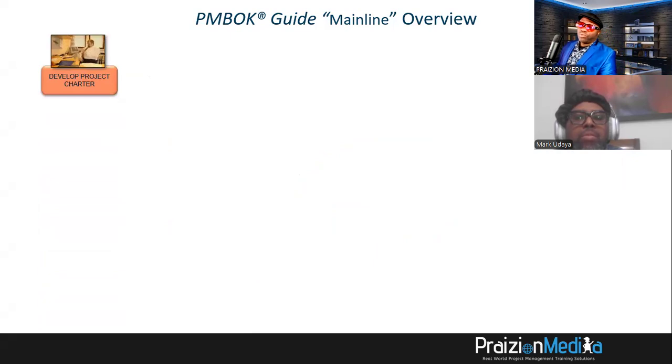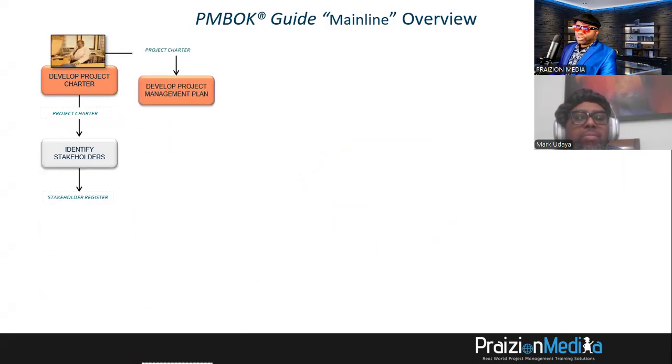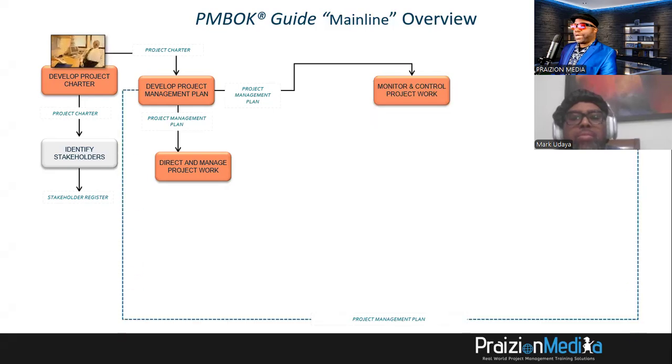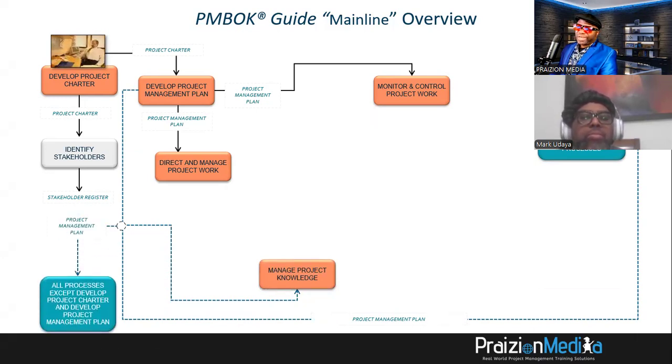The project manager works with the sponsor, they develop a charter, it feeds the identification of stakeholders and a stakeholder register. The charter also feeds the development of the project management plan. The project management plan feeds the directing of the project work and the monitoring and controlling of the work. The project management plan feeds all integration, monitoring, and controlling processes. The project management plan also feeds managed project knowledge and it feeds all processes in the 49 except two, which is the development of the project charter and the development of the plan itself.